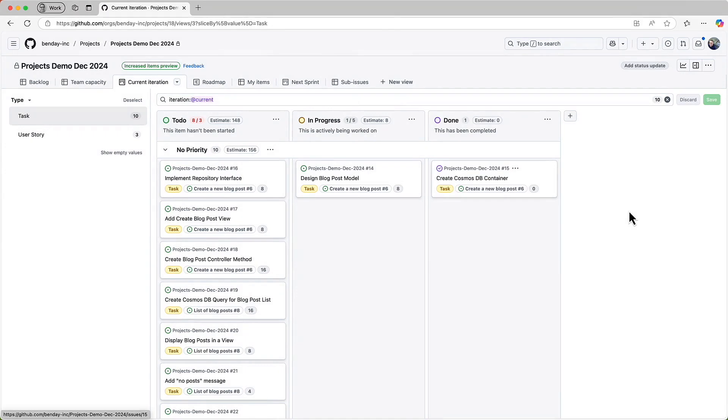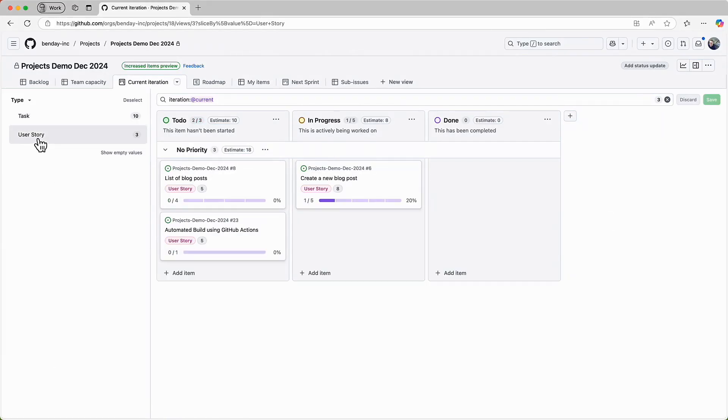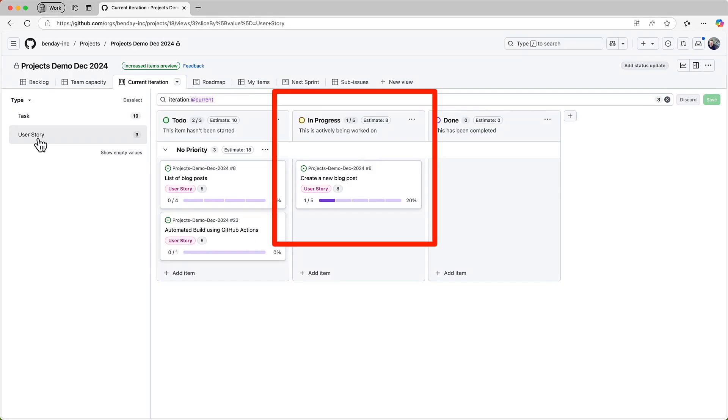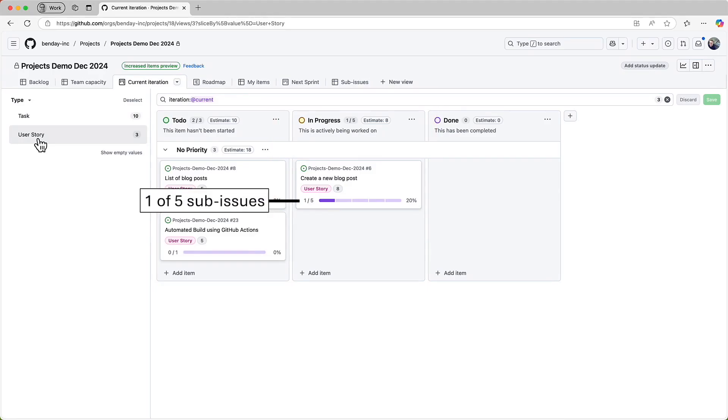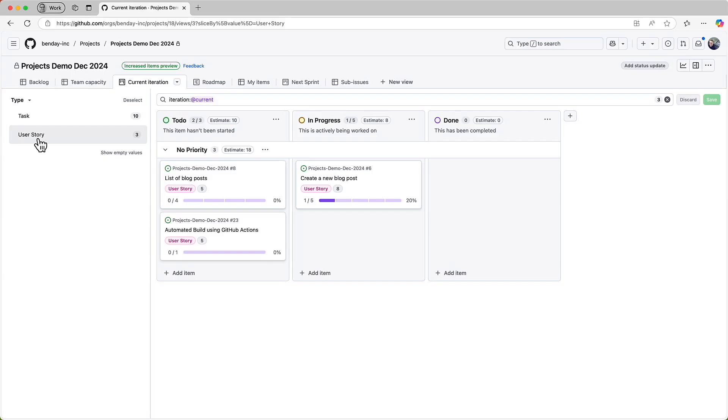Remember, I tend to think of the task slicing view as being aimed at the development team. Let's flip the slice value to user story. This is the feature focused, the PBI focused view of the current sprint. The dev team has one PBI in progress right now. One of the five tasks for that item has been done. None of the PBIs are completely done. So that's the product owner centric view of the sprint. And it's easy to get that understanding of the status just by quickly taking a look at this user story sliced view.